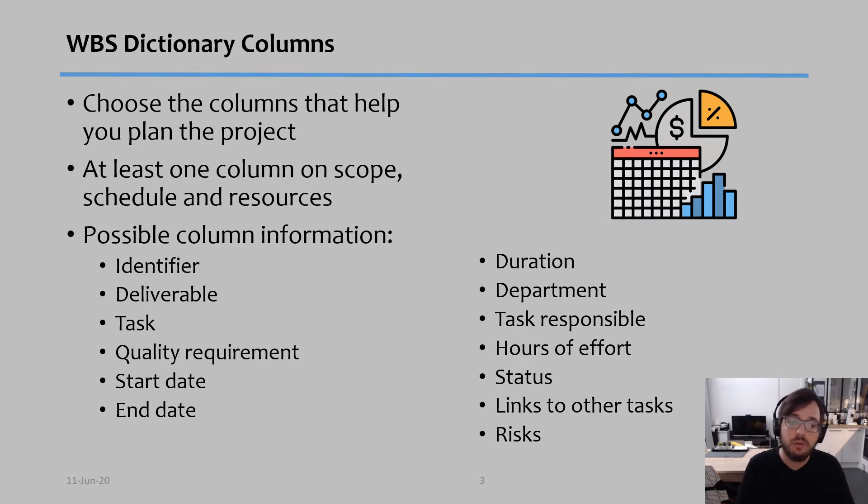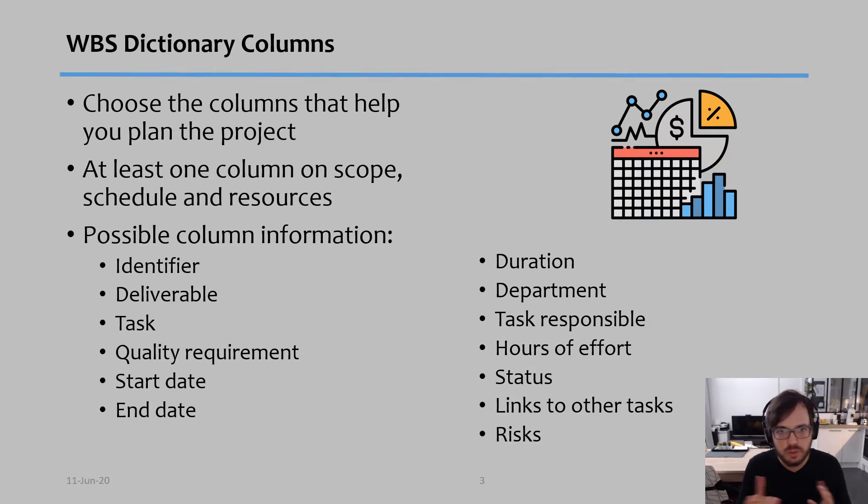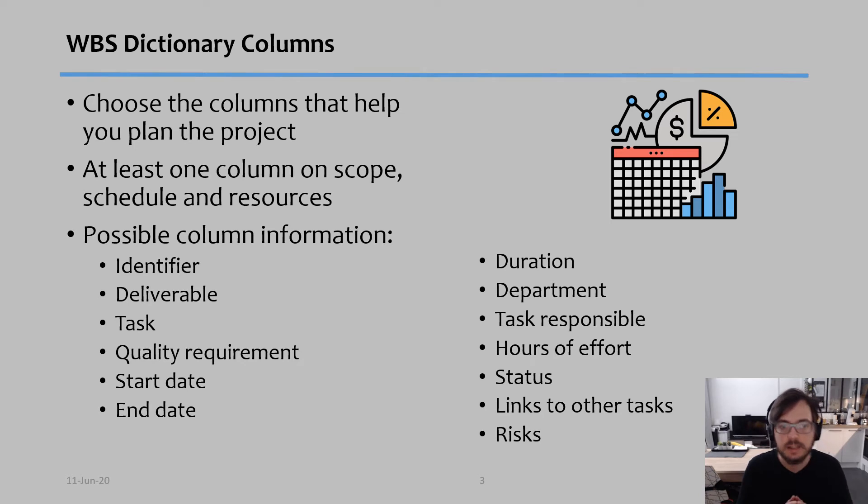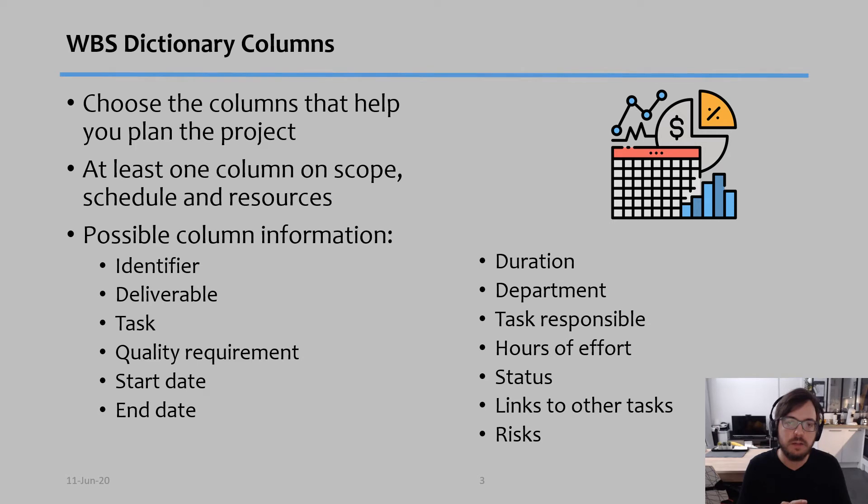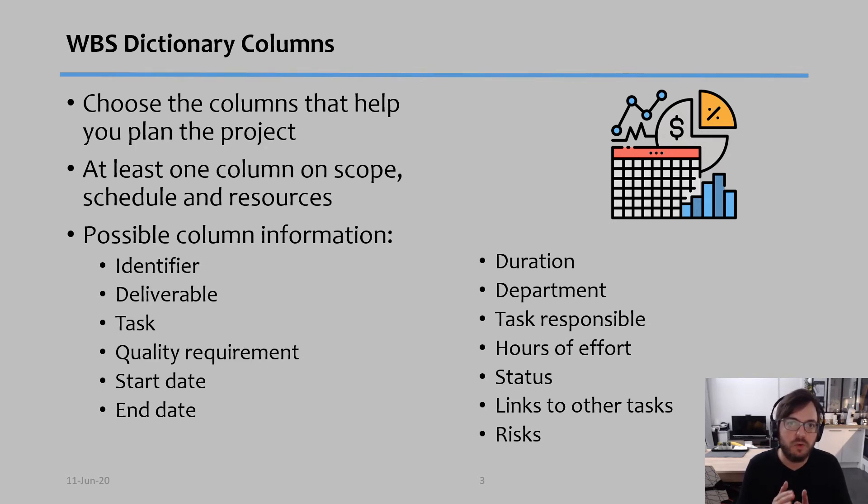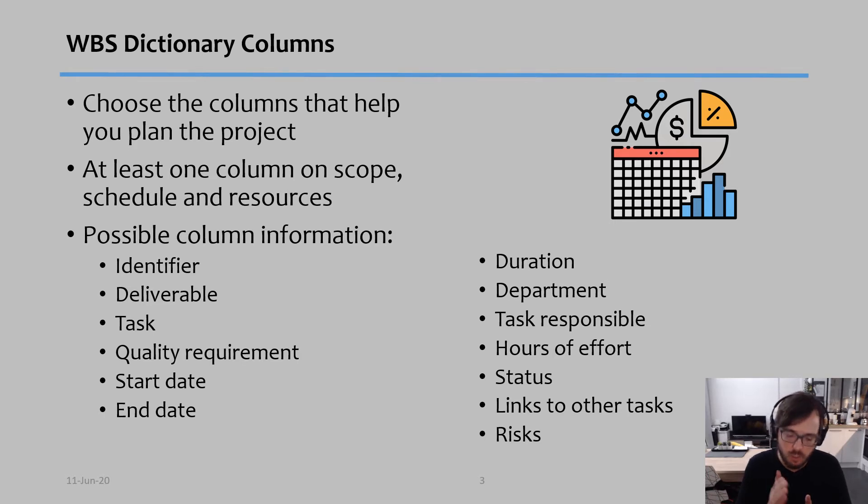Then we have task description, which basically describes what is the work that must be done in that task. Quality requirements. So at what quality we want to reach, for example, we could work on a task indefinitely and keep on improving the quality. So a lot of times we also have to define when to stop.